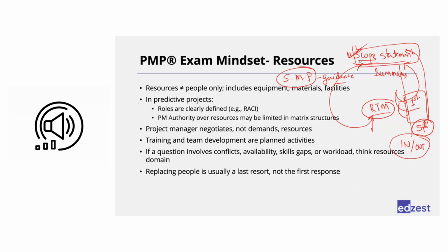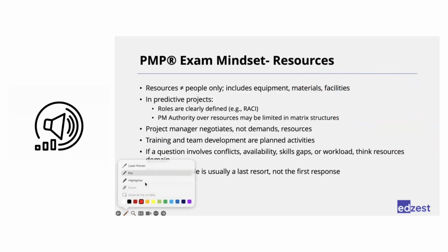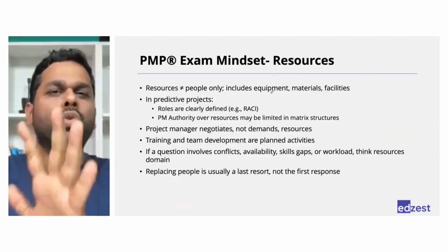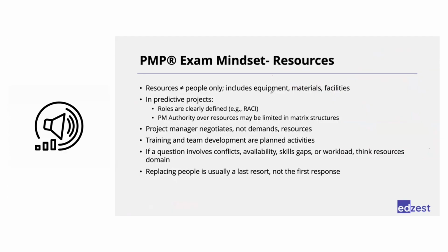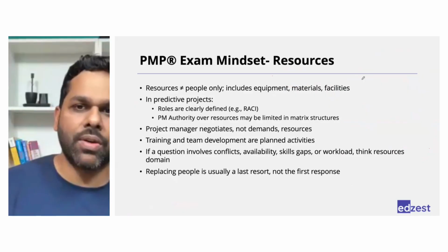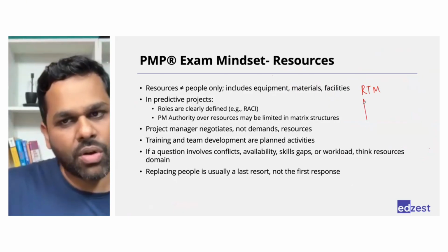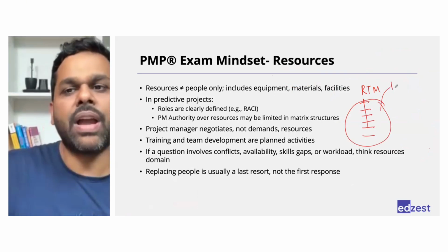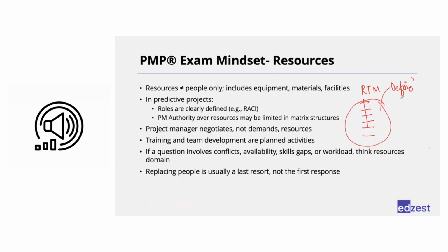So basically, we have to understand the financial things, but we don't need to mention them in the scope statement. Scope only talks about the deliverables. What are we going to do? The financial things would be a part of your budget. In the requirement traceability matrix, we will mention all those financial requirements, safety requirements, everything, and we will use this to define our scope statement. Okay. Got it.